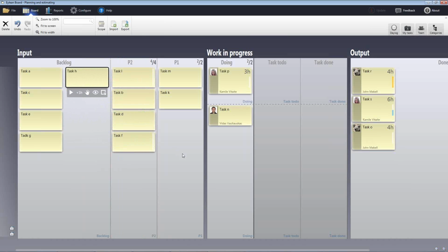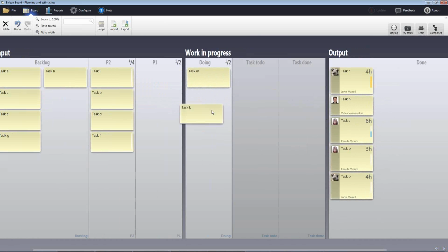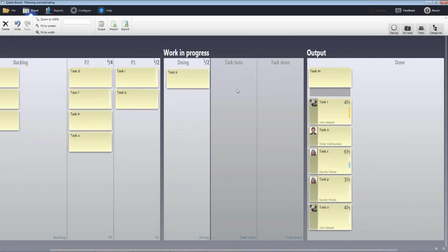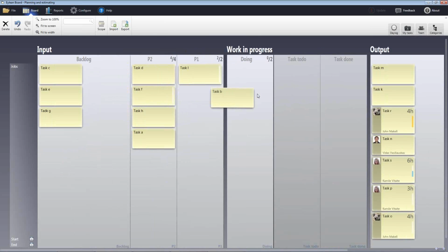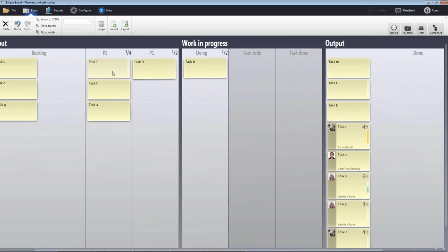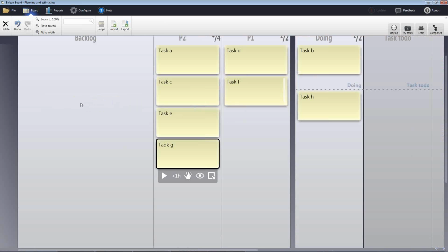Now, getting back to this planning method. Whenever the buffer empties, tasks will travel, eventually something will be finished, and the backlog will become empty. When the backlog becomes empty, this is the sign that we need to do the planning. This is the sign that people will soon need new work items to work on. This is the trigger: empty backlog.